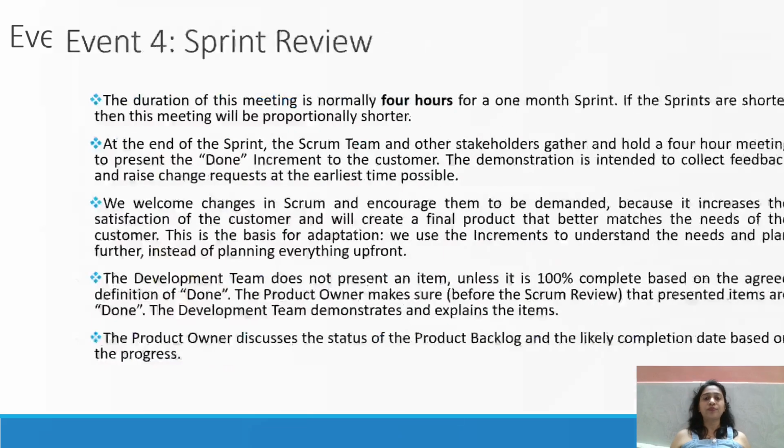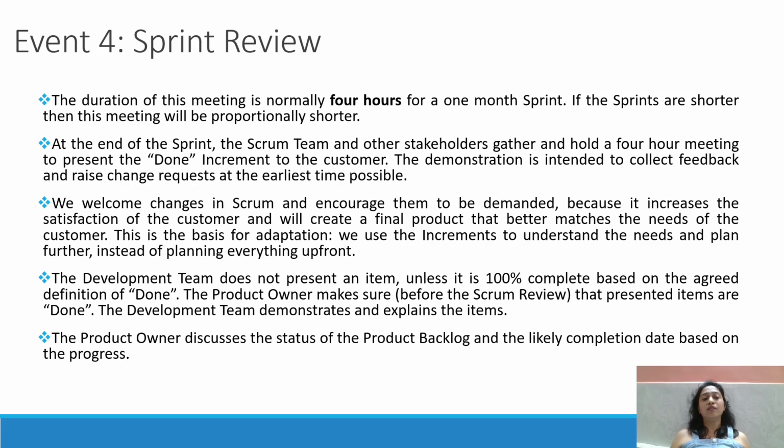In this sprint review, you can see the duration of this meeting is normally 4 hours for a 1 month sprint, meaning 2 hours for a 2 week sprint.